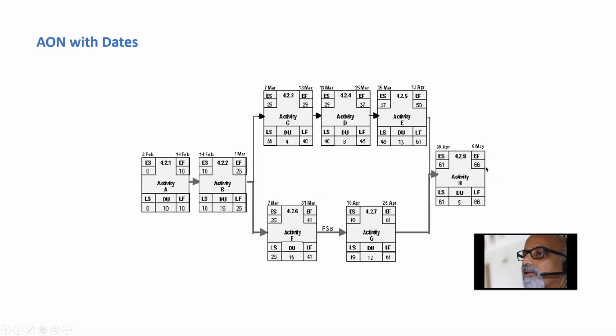That is exactly what the scheduling tools do. So we have these activity sequence diagrams, maybe multiple for each discipline, and we merge them together into a cohesive integrated project schedule, and the tool works out the critical path, and the critical paths, through trial and error, we have to optimize them.